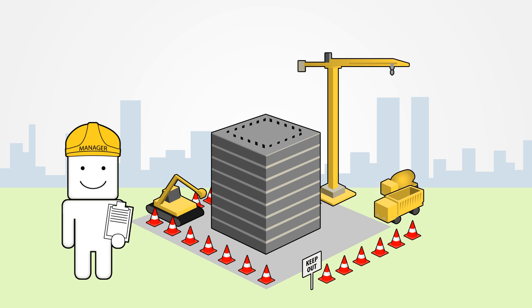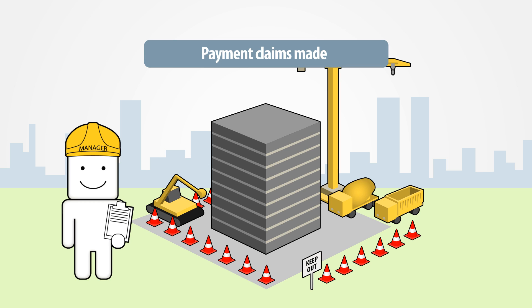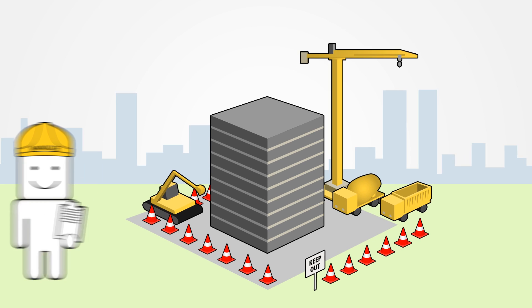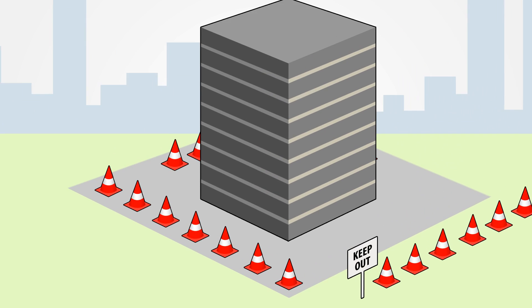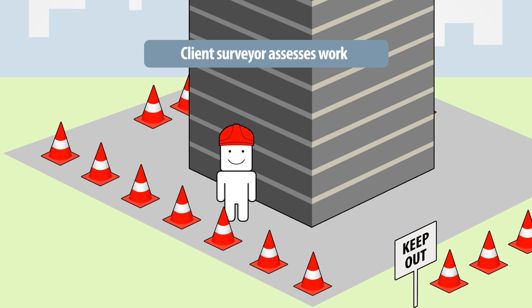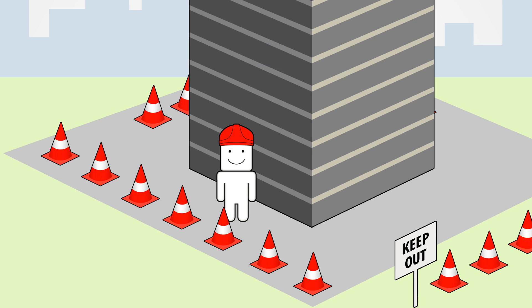The building is carefully completed and claims can now be placed for tier 2 completion and main contractor milestones. The client's quantity surveyor then completes an assessment of the work to verify that the project has been completed to the appropriate standard.